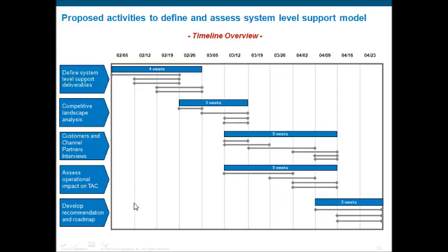One of the things you might do is maybe compress the width of this chart, and underneath here, create a big long box that talks about deliverables. And within each of these major Gantt elements, we might have a sub deliverable that we present to our client. I think that would be a very good add to this chart that's currently not represented here. But what are the major deliverables within each of these sub buckets, and what are the major gates, right?